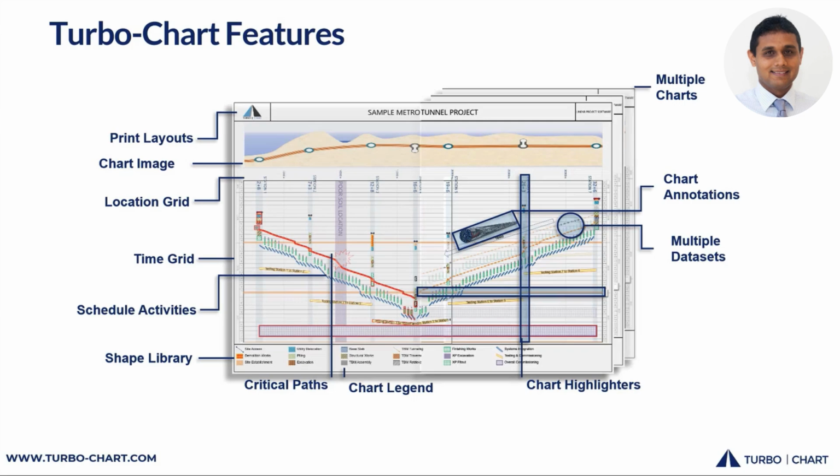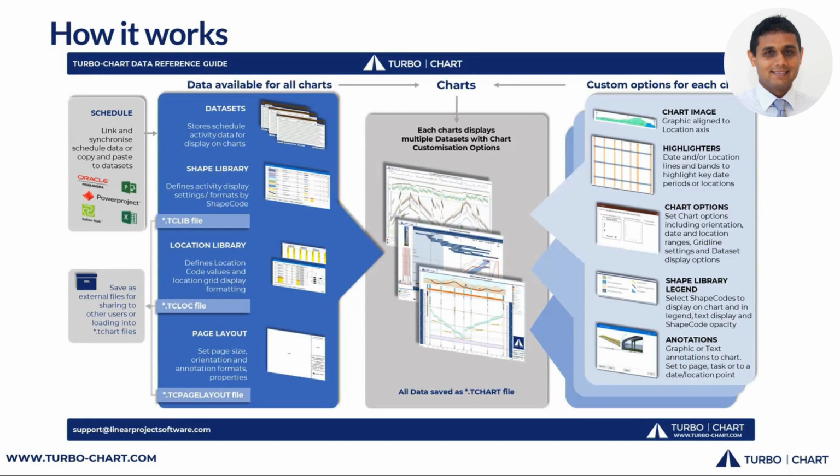We also have the ability to generate multiple charts from the data that you bring in. So as an example, you might want to have one chart that demonstrates, for instance, all the civil works, and another chart that demonstrates just the signaling and the mechanical, electrical work. We can have multiple charts, but they all collect the data from the same source. So you're not having to manage multiple files or manage multiple data sets. If you actually dive into using the software, it can help you a little bit to understand how it's structured. But essentially what it's saying is there is some data that we bring in that's common for all charts, and then there is some data which is specific for individual charts, all within one file.